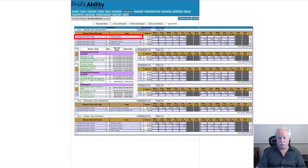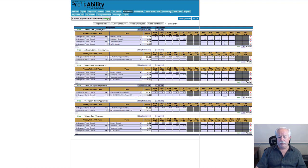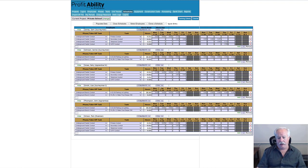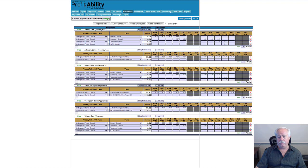You know that clicking on a task assigns it to a worker, and you can clone a schedule - once complete for one worker, you can assign it to others without recreating it for each crew member. Just select their name and send it right to them. The schedule is adjustable from four to seven days per week, and the program accepts whatever data you put into it.